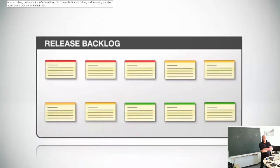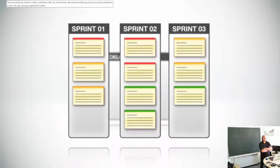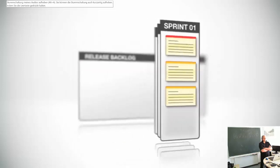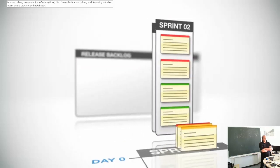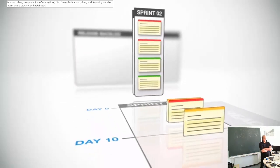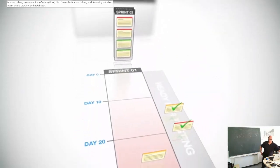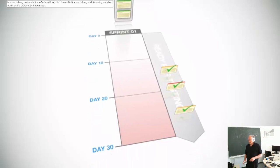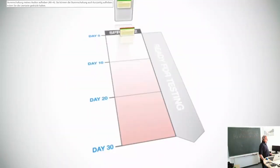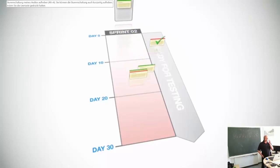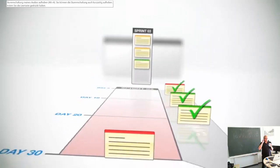At this point, we can take our release backlog and split it up into several sprint backlogs. One of the most important things to remember about sprints is that the goal of each sprint is to get a subset of the release backlog to a ship-ready state. So at the end of each sprint, you should have a fully tested product with all the features of the sprint 100% complete. Since sprints are a short but realistic representation of part of the product, a late finish is a great indicator that the project is not on schedule.